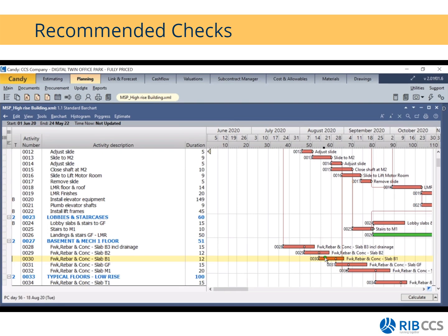This is something to note, because when you work in MS Projects or Primavera, you need to take into account the way of links in that specific program. In Candy, we make use of double links, meaning a start-to-start relationship with an end-to-end relationship. In this case, we have introduced a start-to-start relationship, but because it is open-ended, if there is a delay on this specific activity, it has absolutely no effect on the succeeding activities.